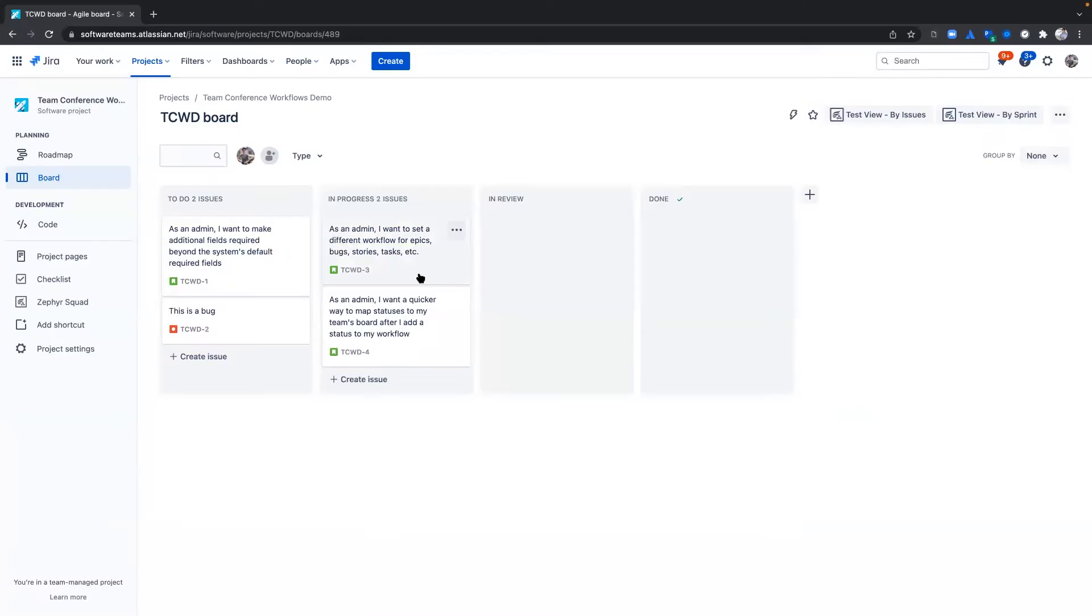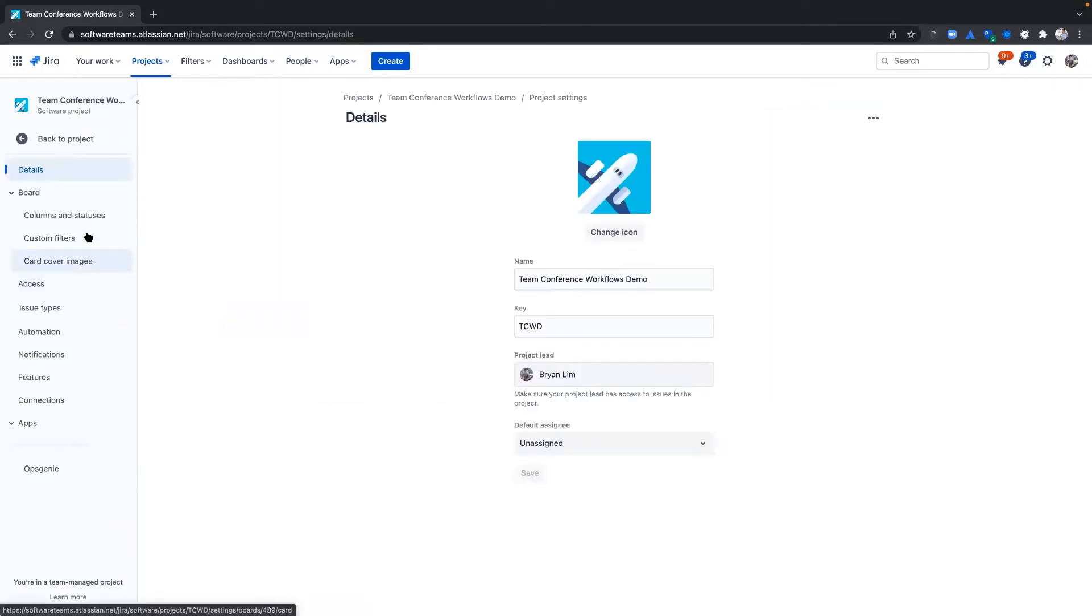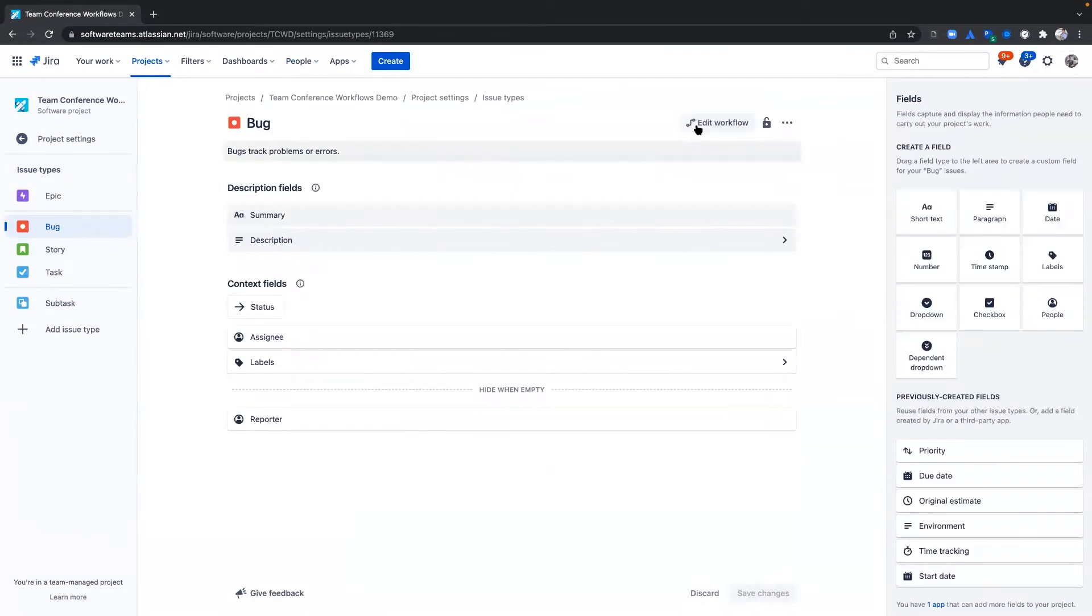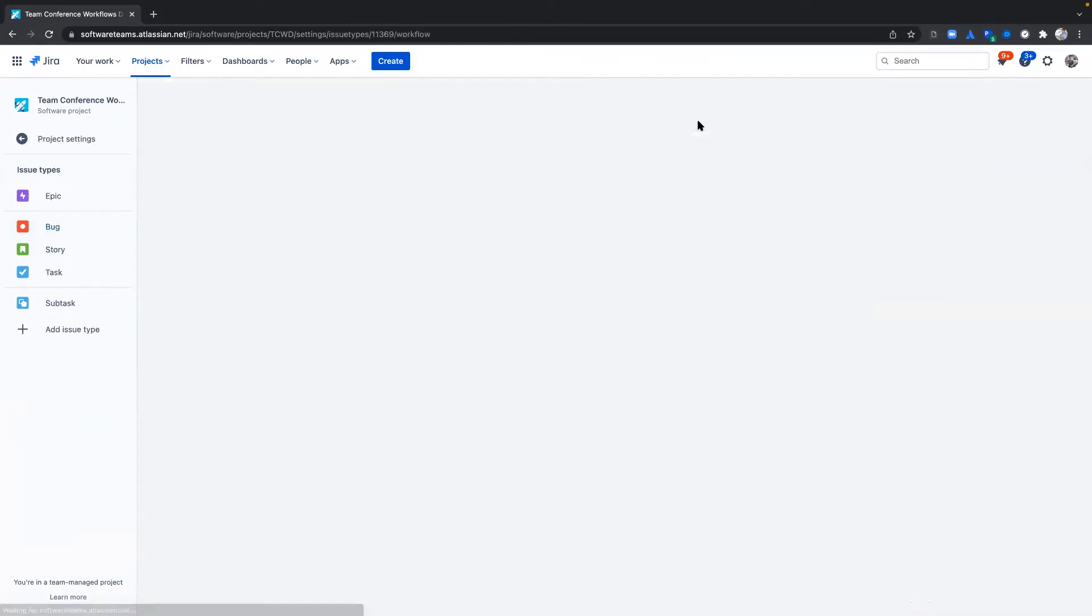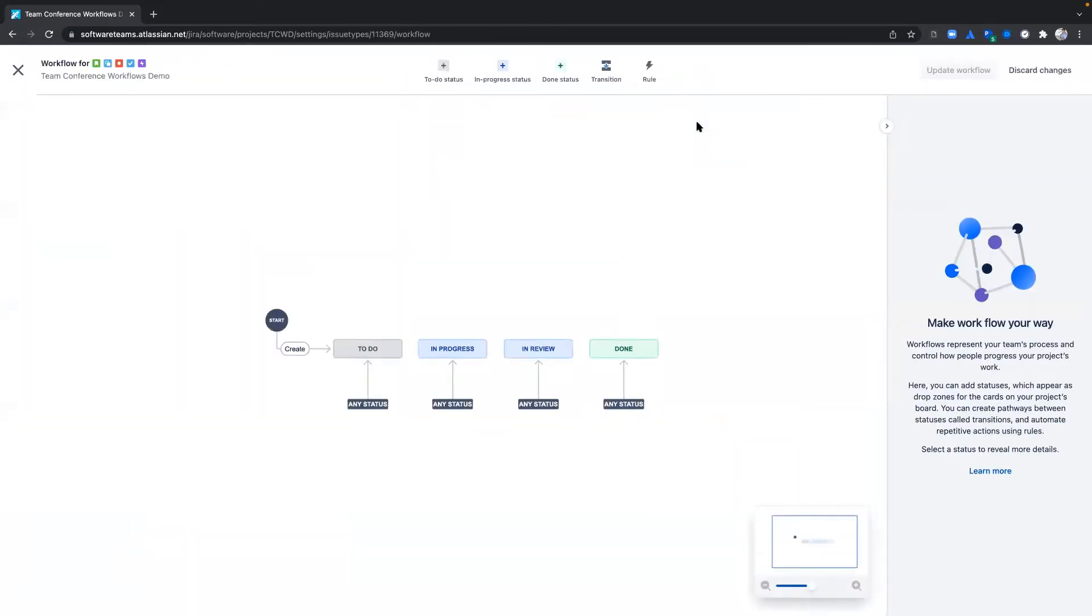First, navigate to the workflow editor via the Edit Workflow button under Issue Types in Project Settings. A Jira workflow is a set of statuses and transitions that an issue moves through during its lifecycle, and typically represents your team's process.